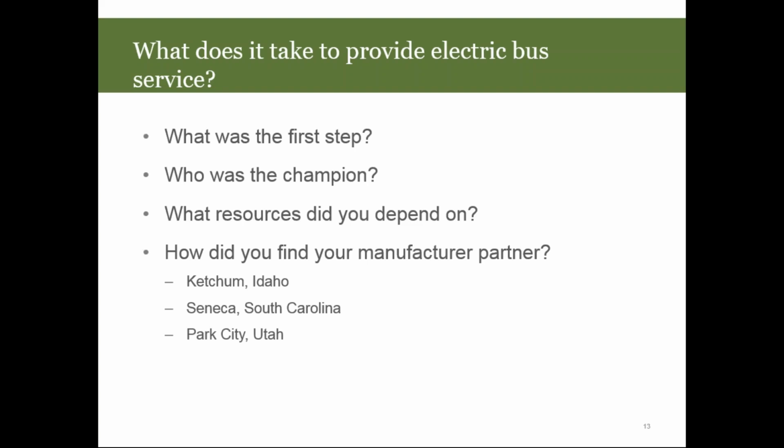The first step was putting it into an update to a 5-year strategic plan and a path to get about a third of the fleet to battery electric within 5 years. So that was the first step, and then that led to a lot of the other aspects that have been talked about on the technical side that Keith and Blake mentioned, on route profiles and how they might operate.